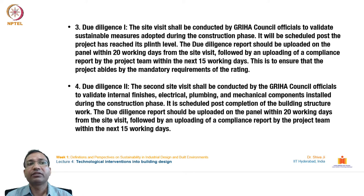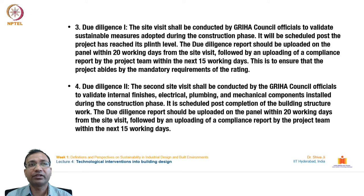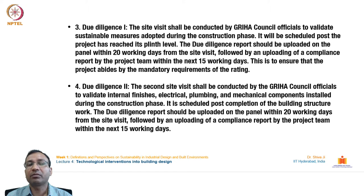Next comes Due Diligence Stage 1. A site visit is conducted by GRIHA council officials to validate sustainable measures adopted during the construction phase, scheduled after the project reaches plinth level. The due diligence report must be uploaded within 20 working days from the site visit, followed by a compliance report from the project team within the next 15 working days.